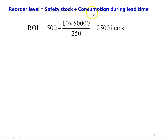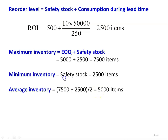Reorder level equals safety stock plus consumption during lead time. Safety stock is given as 500 units, and lead time consumption = 10 × 50,000 / 250 = 2,000 units. So reorder level = 500 + 2,000 = 2,500 items — meaning when stock reaches 2,500 items, place a new order. Maximum inventory = EOQ + safety stock = 5,000 + 2,500 = 7,500 items. Minimum inventory = safety stock = 2,500 items. Average inventory = (7,500 + 2,500) / 2 = 5,000 items.